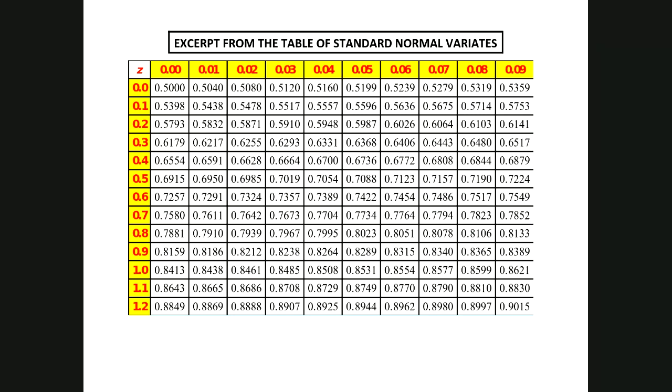So at these two values, we're going to choose the larger because we want our chance of completion to be at least 75%. And so that value that corresponds for our z-value is 0.6. We read over here to the left, and then we read up, and then we add 0.6 and 0.08 together.